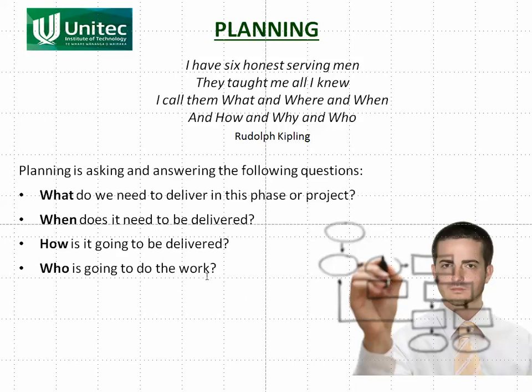As a project manager, you're not doing it directly. If you were a project manager for a construction job, you would brief the earthworks foreman: this is what I want you to do, this is the machinery you've got, this is the time, this is the budget, and he would take responsibility for it. So you break off what's called a work package and give that to the foreman, and he is the one taking responsibility for it, although you have to, as the project manager, have an overview and make sure he's doing it properly. So you're asking these questions mainly,